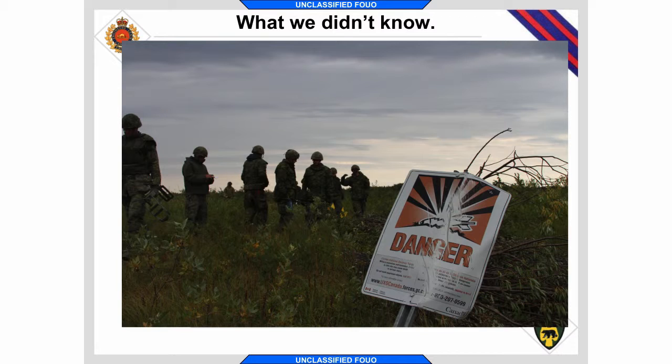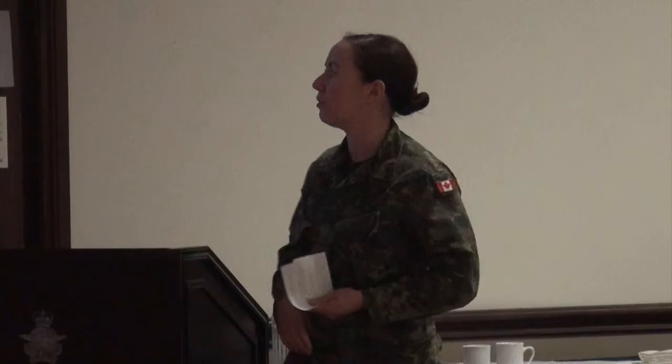The biggest unknown that we had, we knew they had placed, well, what we were told was TNT down those pipes, but we didn't have a lot of collective experience in our organization dealing with civilian explosives, especially those that have been left in the ground for 60 years. So my biggest unknown was the volatility of this explosive, what I was actually dealing with, and what the risks were associated with that, like sensitivity to shock, sensitivity to friction.